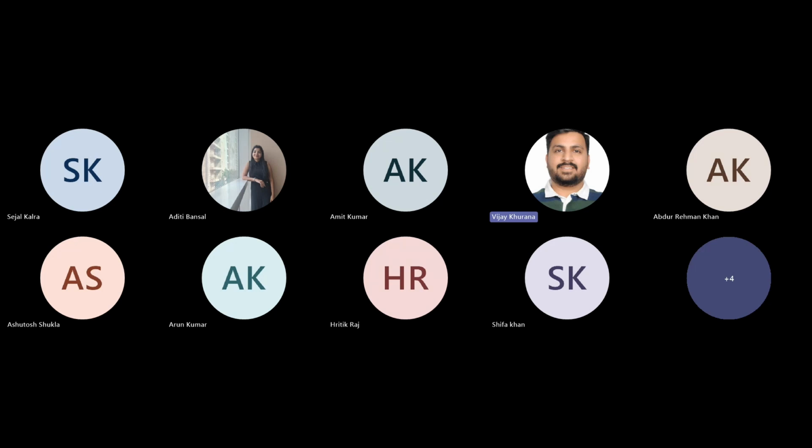So what we need to do once we upgrade that patch, we will have the list of manual issues. Then the technical lead has to go and check in detail what all issues we have seen. That utility will provide the list of issues. It could be hundreds, it could be thousands, it could be lakhs based on the number of customizations which were there in Navision, right? And then the technical person has to resolve those issues. If it is resolvable, there might be scenarios which we have seen where we might have to change the business process to cater to a scenario, because some things were possible in Navision, but because of user interface changes, those things were not possible in the web, right?